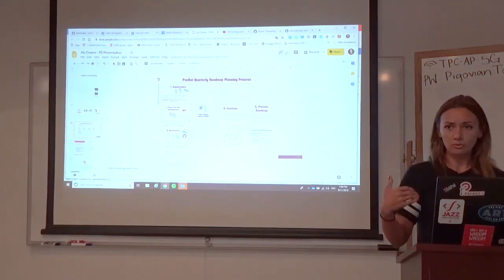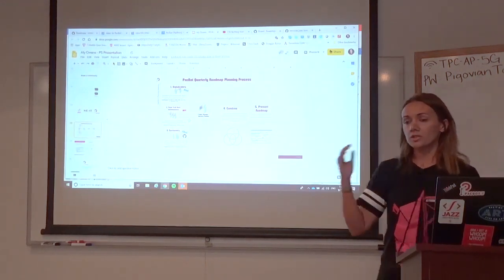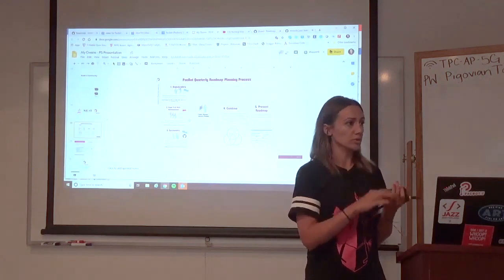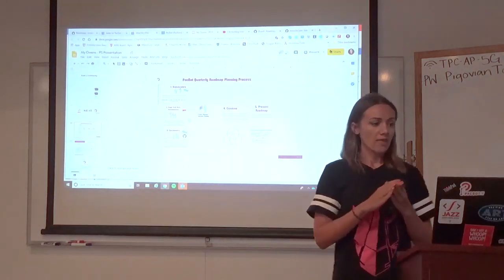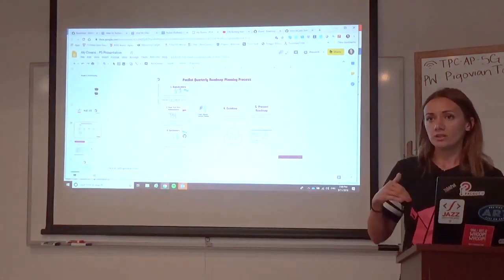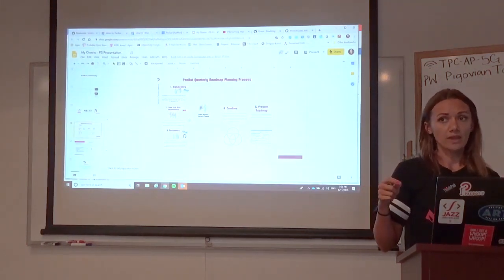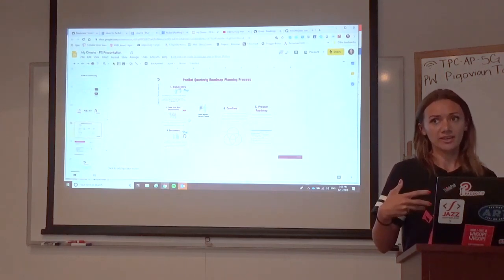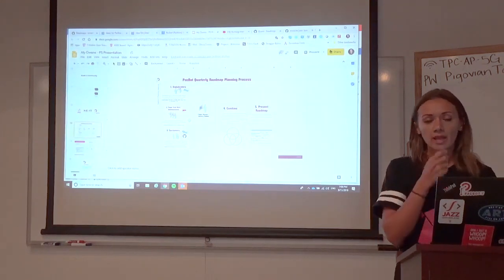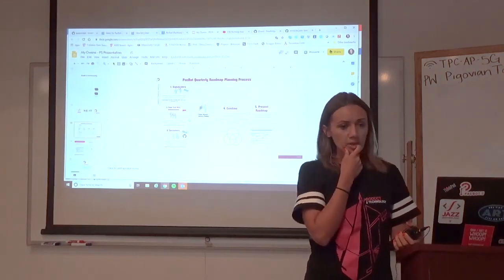And then we go into the roadmap meeting. We discuss all the different features. We want more details. We cover that. And then we say, thank you. We're going to give you a week to vote on your ideas, and then inject that into our roadmap. So we did do that.